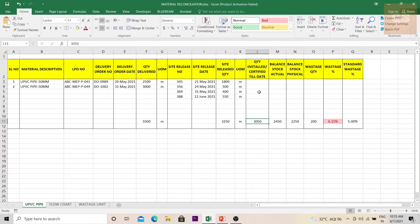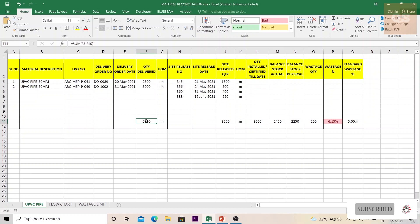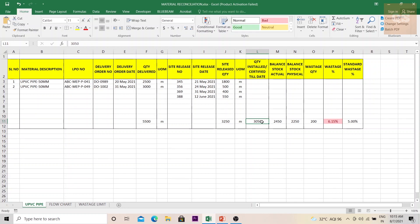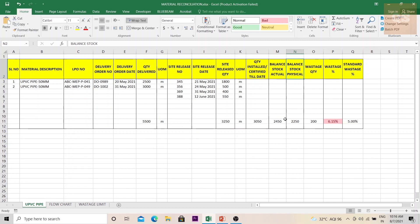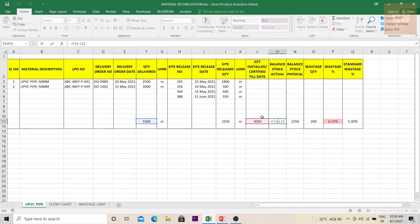Once you have this information, the next piece of data you need is the quantity installed or certified to date by your client or consultant. You can get this easily from your certified payment applications. For example, out of 5,500 meters delivered, 3,250 meters were released to site and 3,050 meters were certified to date.